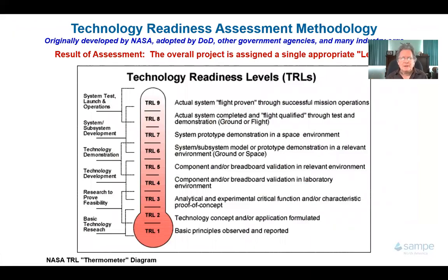So how do we actually assess technology readiness? The industry standard methodology was developed by NASA many years ago, and they made a 9-level scale. So readiness level 1 is, I have an idea, it sounds promising, there's no obvious reason it doesn't work. Let's start on our project. That's kind of level 1. And then you scale up from there through size, through complexity, through integrating details, and you build all the way up. And then when you get to level 9, you have production hardware that you build every day in service, and you know everything works.